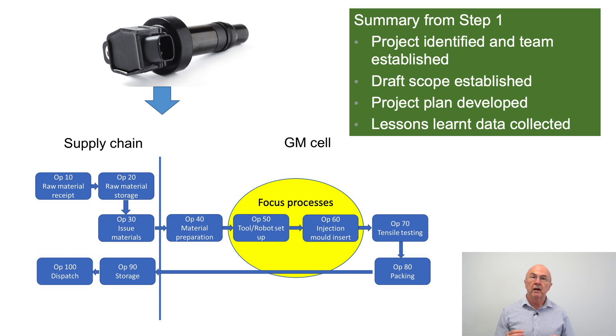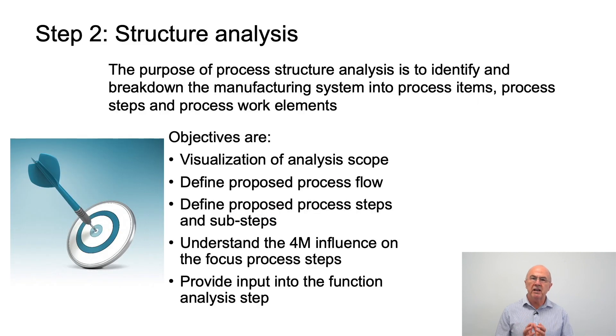The purpose of step two structure analysis is to identify and break down the manufacturing system into process items, process steps, and process work elements. The objectives are visualizing the scope, defining the process flow that we plan to use to make the product, defining the process steps and sub steps.